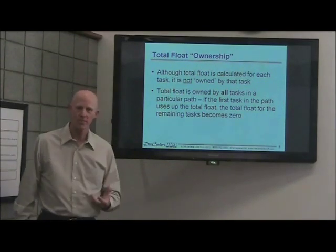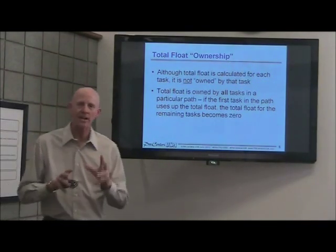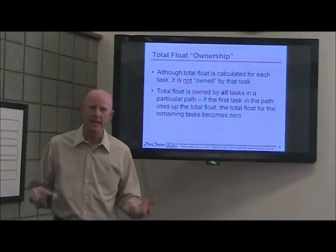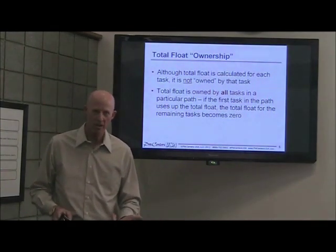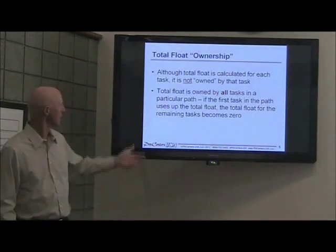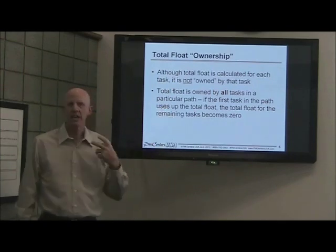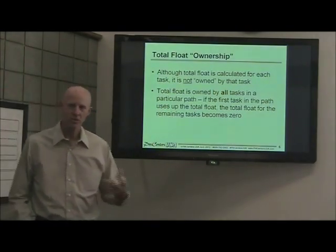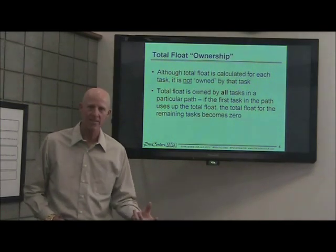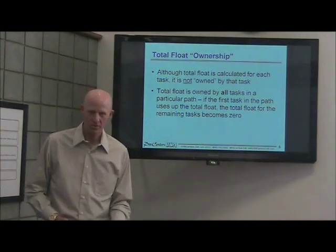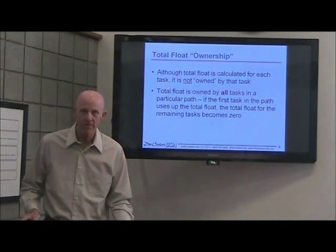Total float ownership — be aware of this. It's not owned by the task. It's like playing in a sandbox with your friends; you have to share. It's owned by all tasks in that path. If the first task in the path uses up the float, the rest of the tasks don't have any float — it goes away.